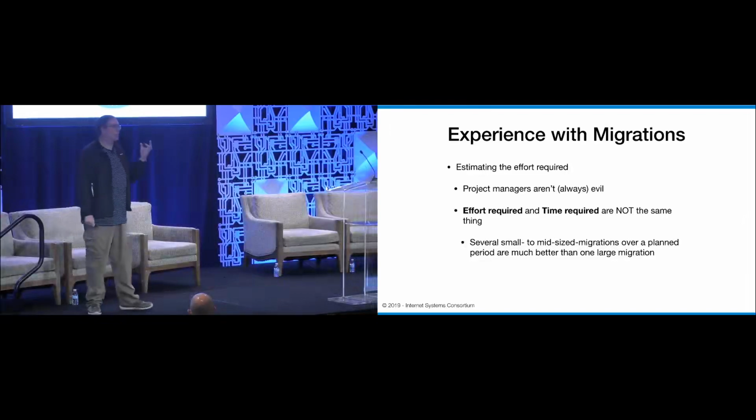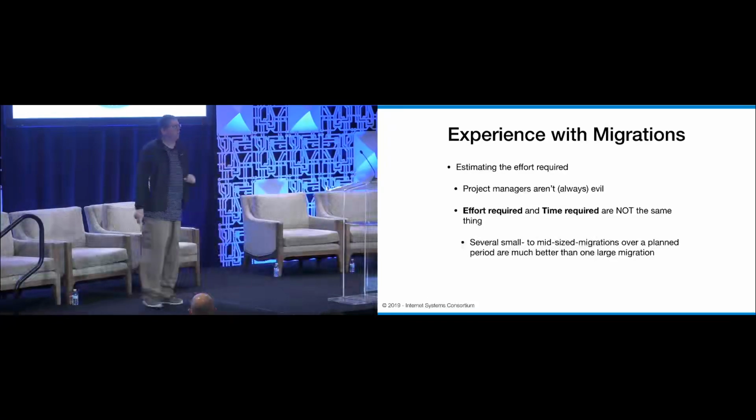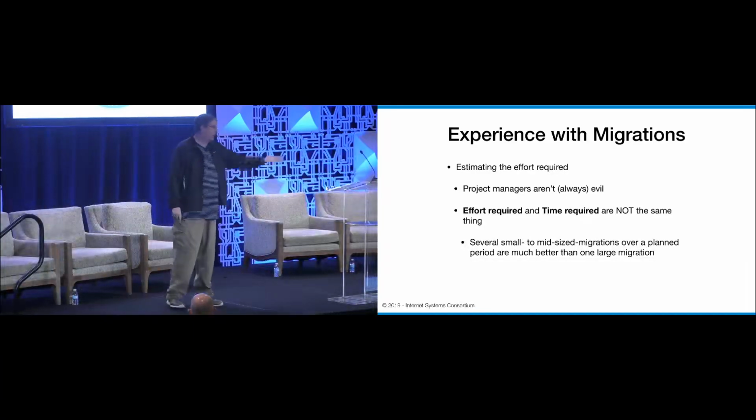So think about the organizations. Think about how your network is actually split up, and pick out individual pieces and look at migrating individual pieces instead of doing the whole thing at once. Go in, obviously, labs. Your lab network, that's going to be something that you're going to need to test on.